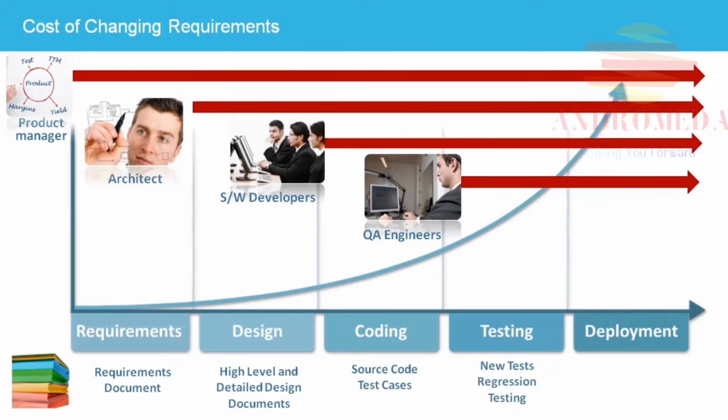If a requirements change is found during validation, the test engineers validating the system, development team, and architect will need to review the change with the product manager to understand how it affects the design, integrated code, and test cases. The requirements and the design will need to be updated to accommodate the change, and then both must be re-reviewed and accepted by the stakeholders. The integrated code will need to be modified, which could affect multiple modules working together in the system. Code changes mean updates to the unit test and QA test cases, and could entail design and code reviews by the rest of the development team to minimize the effect on the existing code base. QA will need to perform a full regression test of all previously passed test cases to ensure the changes did not affect working code.